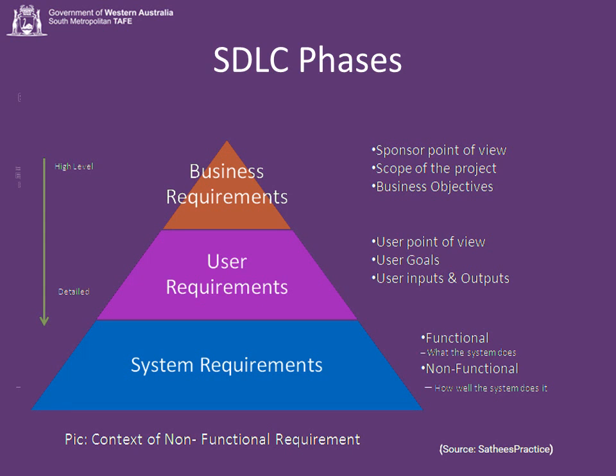All of the models have 6 basic phases. Phase 1, business requirements are gathered. This is the main focus of the project manager and the stakeholders. Meetings are held to determine the requirements, who's going to use the system, how will they use the system, what data should be input into the system, what data should be output by the system. A requirement specification document is created which serves the purpose of guidelines.